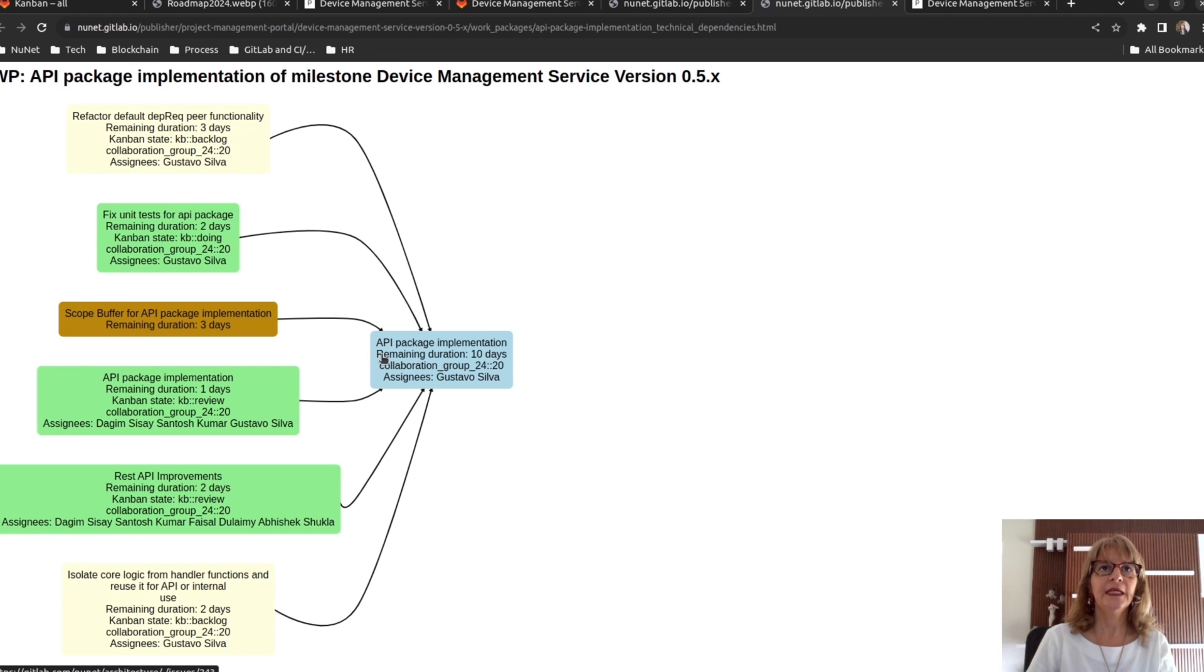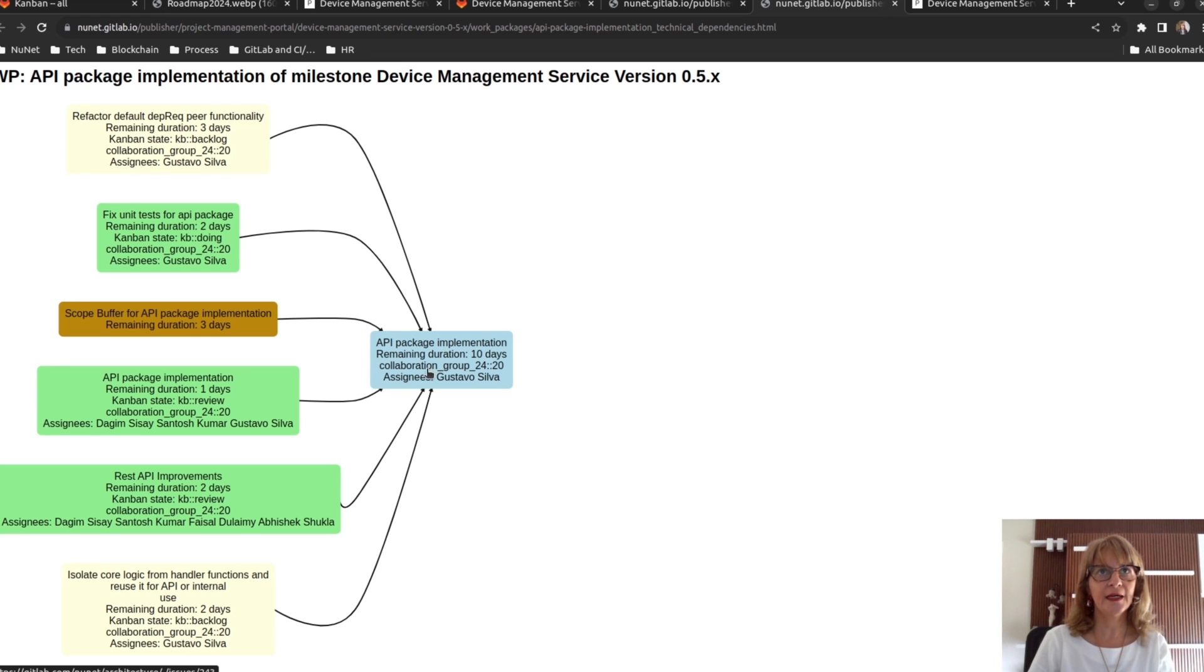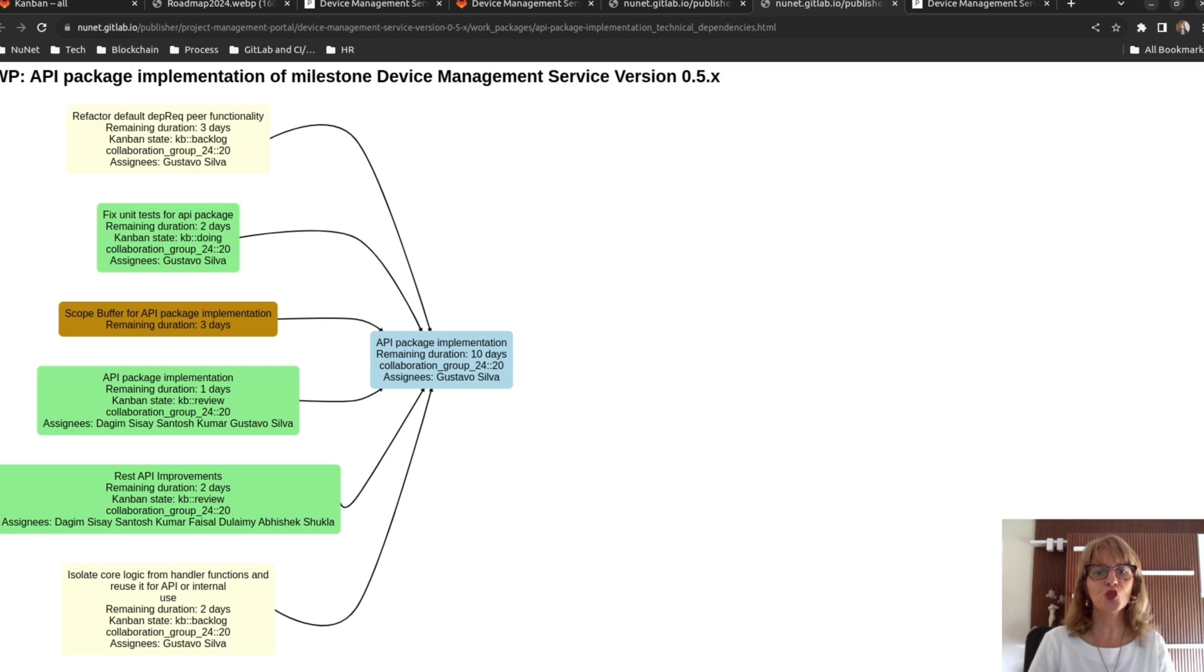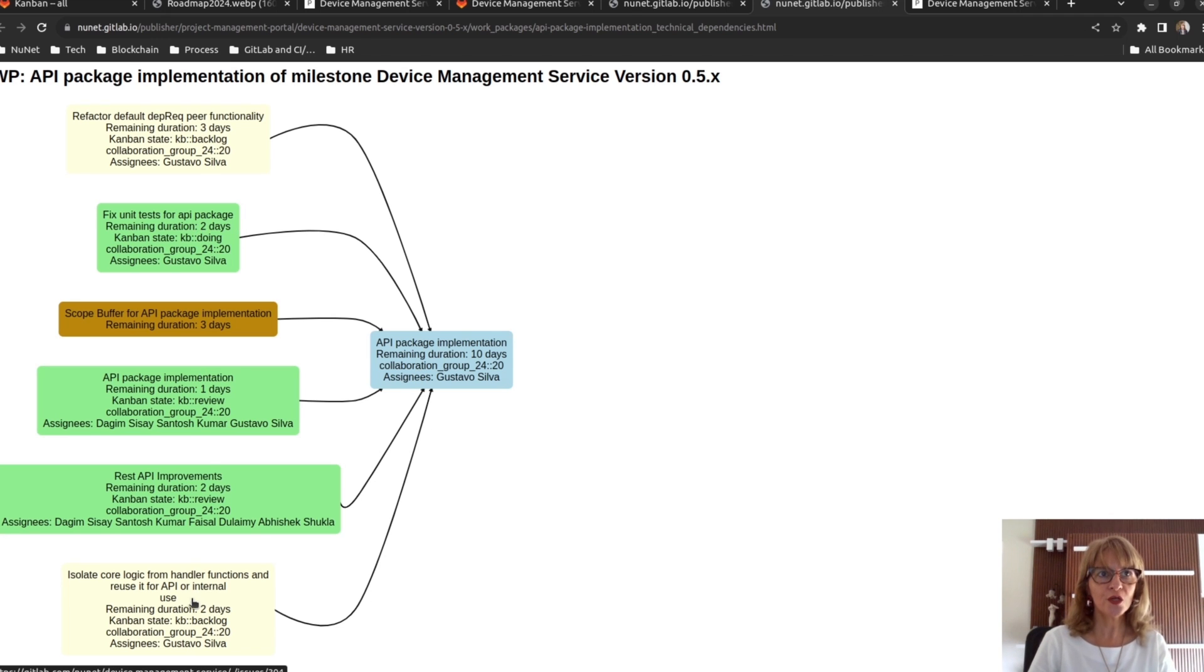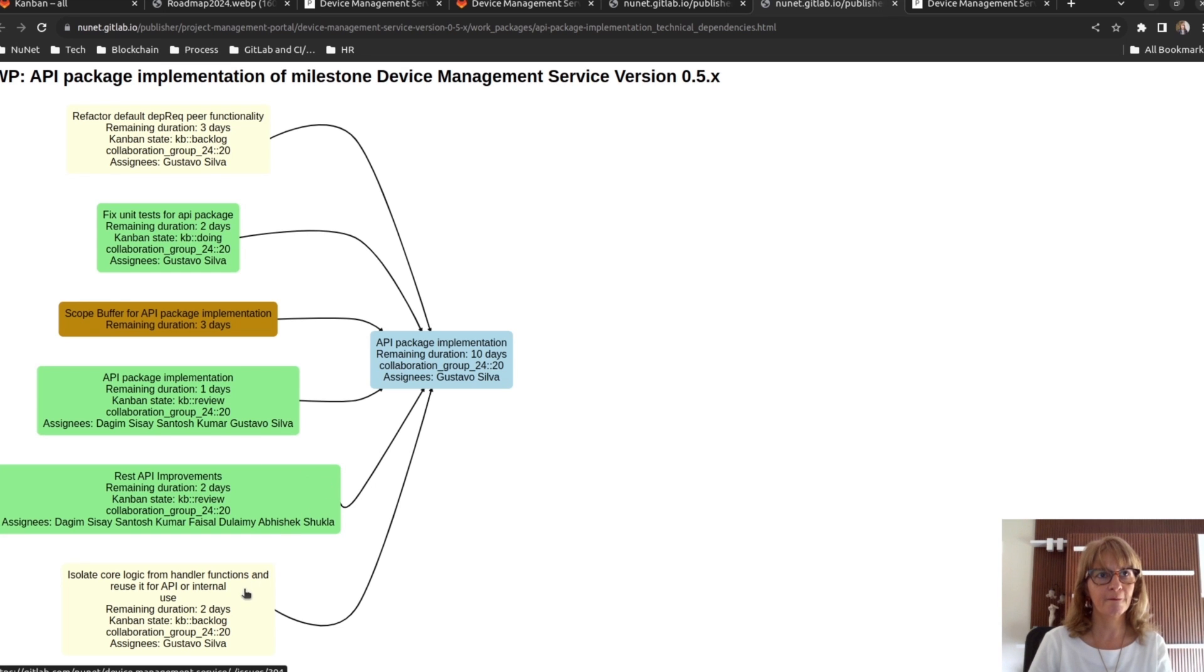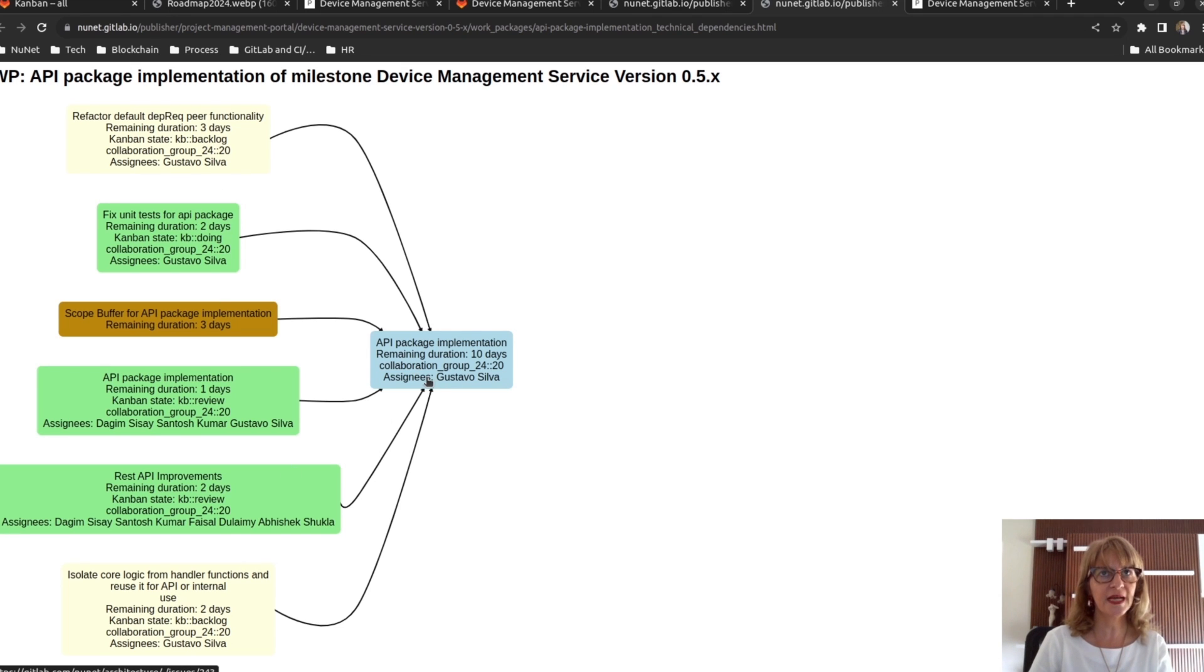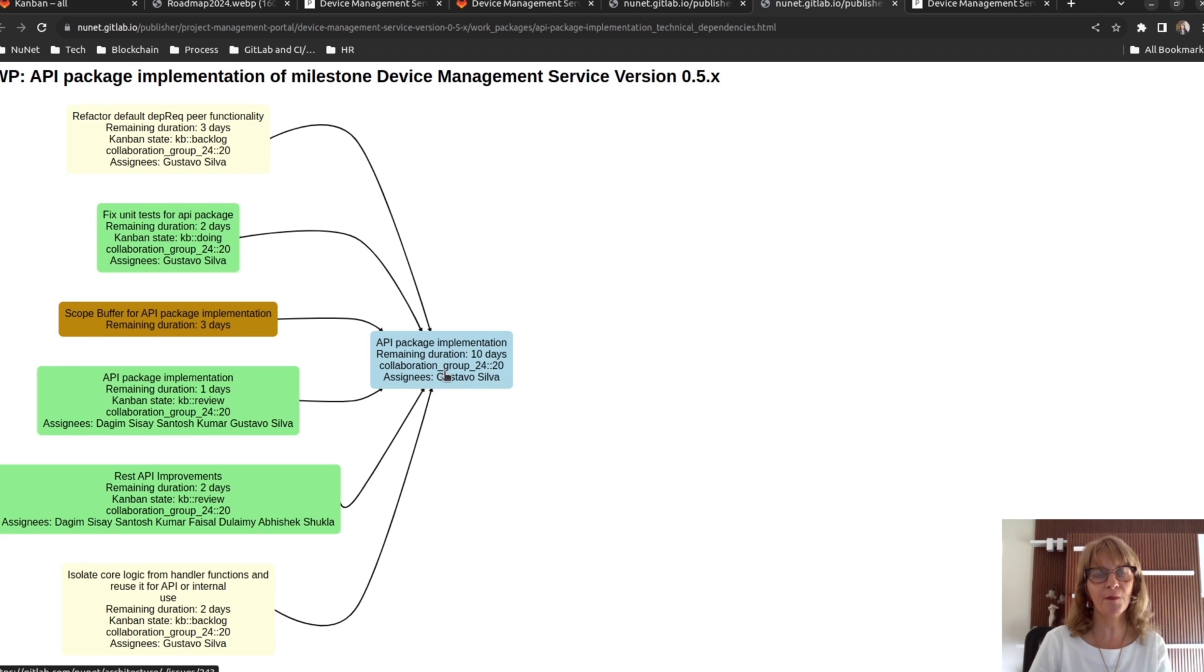Finally, the remaining duration in a work package is the CCPM ETTC. ETTC is the earliest time to completion. And it's calculated considering the resource constraint and the sequence of tasks. Here, we can see that the same person is doing the tasks inside this work package. So, for calculating the remaining duration in the work package.